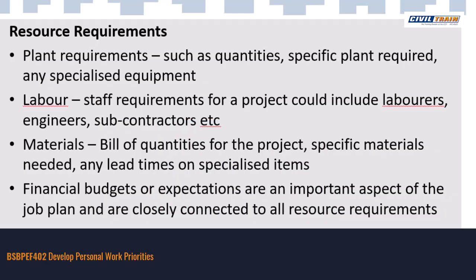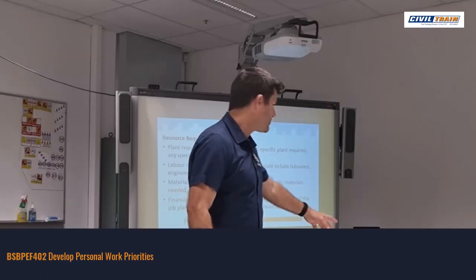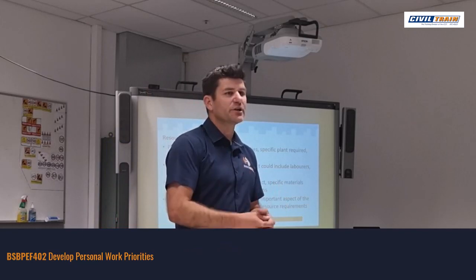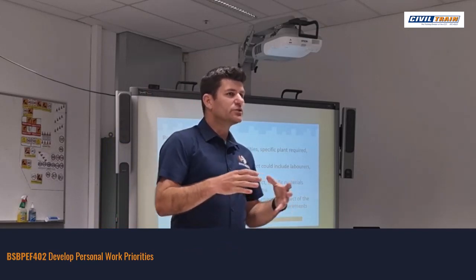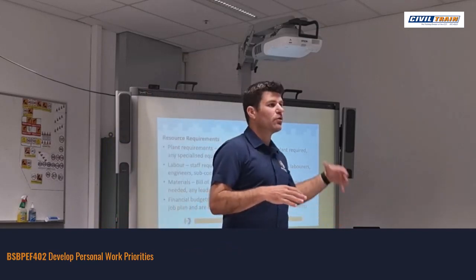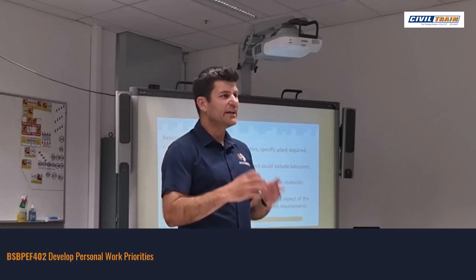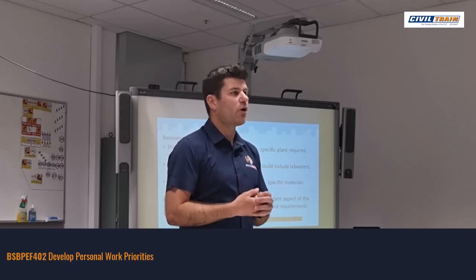Materials, bill of quantities for the project, specific materials needed, any lead times and specified items. So with this particular project, I'm not going to get you guys to write a full bill of materials using specifications, but what I would like you guys to do is identify key materials in the fact of a delivery for your schedule. So if we've got concrete or pipes that are going to be laid, or we've got key resources, I would like to know in your schedule when those resources arrive.